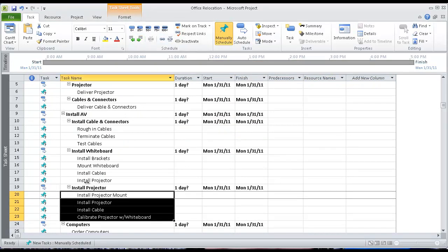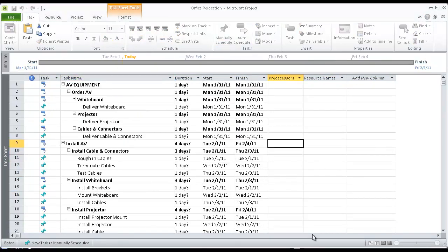After I complete entering my tasks and defining the activities, I start sequencing my activities. Sequencing is the process of identifying and documenting relationships among the activities or tasks. At this point, we are not concerned with dates, deadlines, or durations. We are only concerned with dependencies. What tasks depend on other tasks before they can be completed?